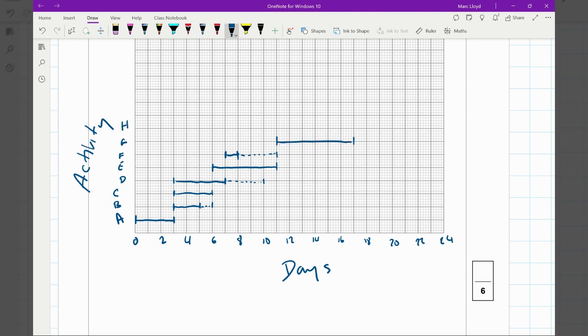H, I have to move to the right on that other OneNote so I can see the rest of my activity network. I am doing this using the activity network. It's really easy. So H has got the early time of 17, which is where we put it. The middle one is the duration, and then the early plus the duration subtracted from the late gives you your float time. So this one's got a float time of 1. I starts at 17, also duration of 2, no float time. And then we've got J, starts at 19, 1, 2, 3, and that's a critical path as well.